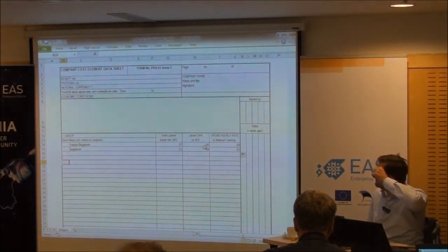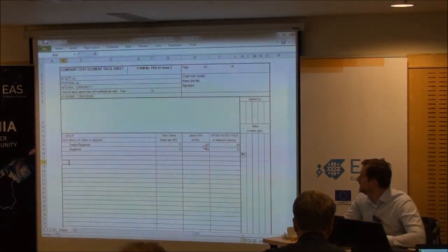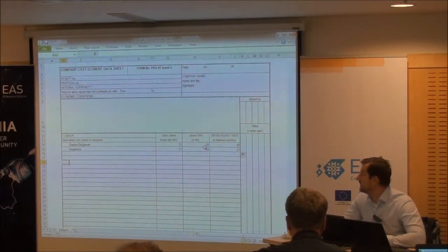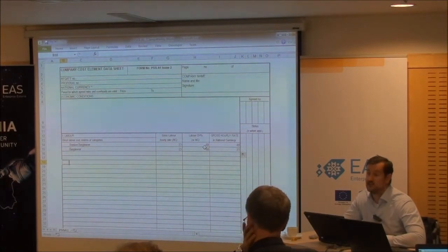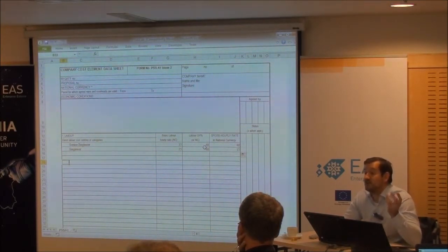But have a look, and I'm sure you'll find material that will help you calculate that if you really don't know what it is. But start asking yourself questions if it's a double. If you're driving that over 100%, then you should be asking yourself some questions. Is this right? Is my management labour twice what the labour rate is? It's not to say it isn't. It could be, and you might have a very good reason for that.